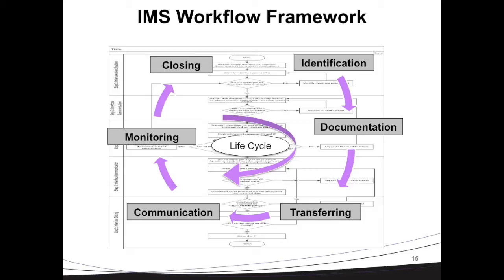Once the contracting party is awarded the contract, all the package is transferred to the contracting party. Then it's the contracting party's responsibility to go through all the documents and approve the adequacy of that information. They can modify some of the information and add more interface points to the system. Once they agree on all the interface points and the information, they start to communicate with each other by issuing interface agreements. Throughout the whole process, we have developed several criteria to measure the performance of interface management.